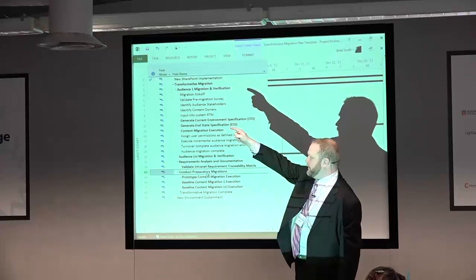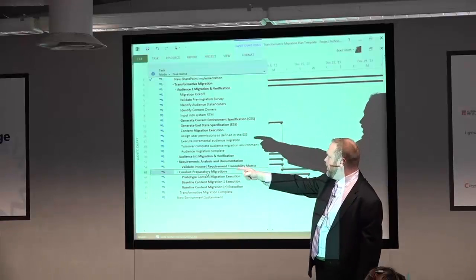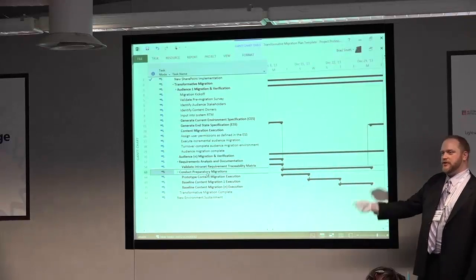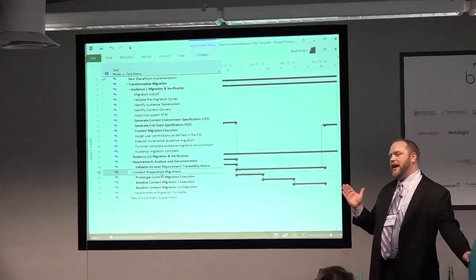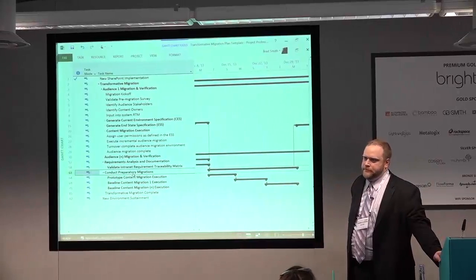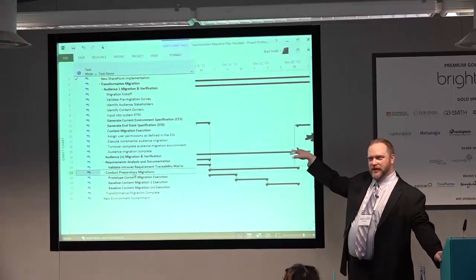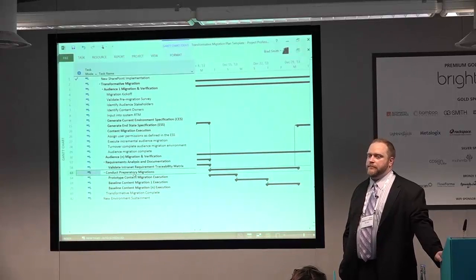So audience 1 is representative of the first user audience. And then audience N is created for every other audience in your organization that needs to be migrated. These are peers. These aren't subordinates. These are things that are happening at the same time. Or they could happen at the same time after you've assigned resources and leveled the project.